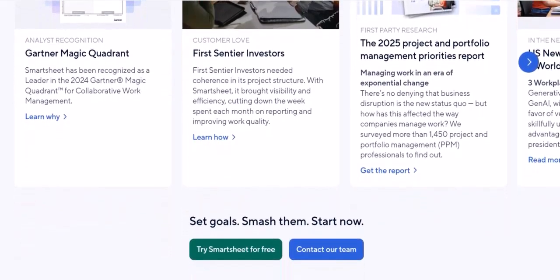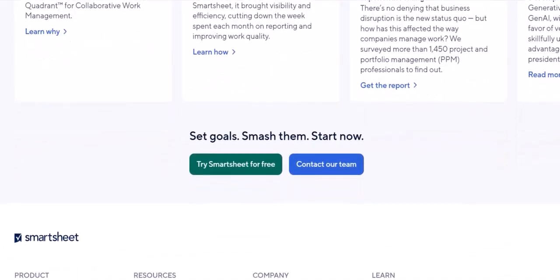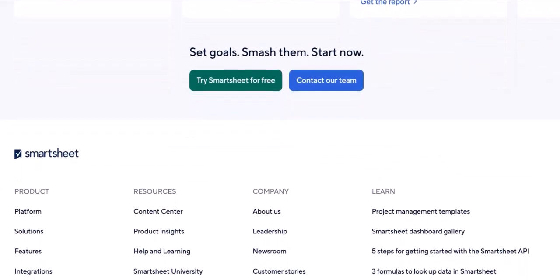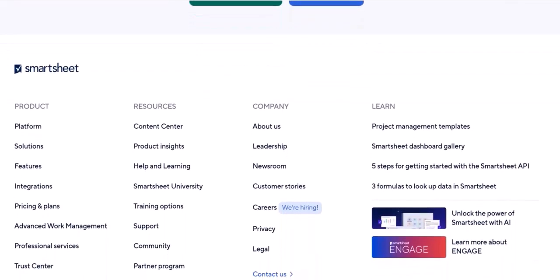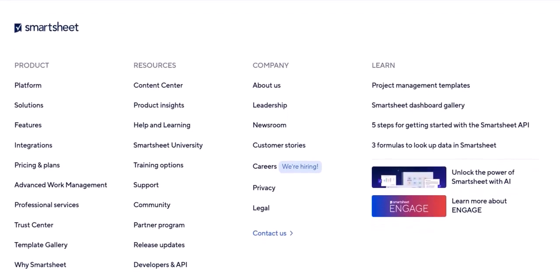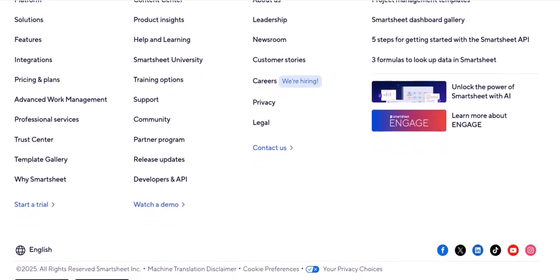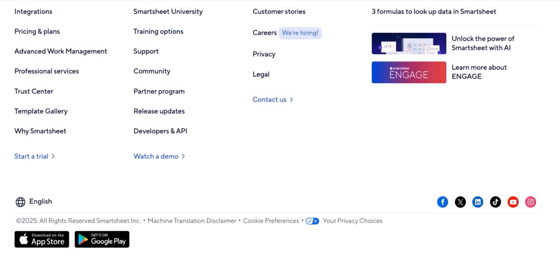You are dependent on the license holder. Your access to the shared Smartsheet is entirely dependent on the active subscription of the user who shared it with you. If their license expires or they revoke your access, you will no longer be able to view or edit the information. Features may be limited based on the license plan of the owner. Some advanced features and functionalities within Smartsheet might be restricted based on the specific license plan the sheet owner has. As a collaborator without a license, you will only have access to the features available under their plan and the permissions they grant.